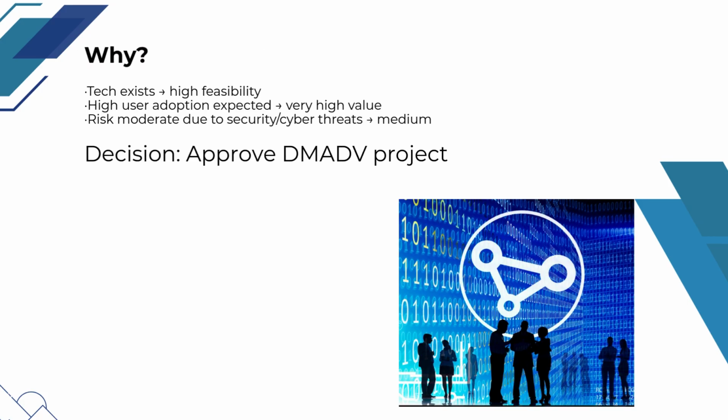The project scores high on feasibility because the required technology already exists, offers very high value due to expected strong user adoption, and carries medium risk because of potential security and cyber threats, leading to the decision to approve the DMADV project for designing the one-tap bill payment feature.